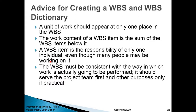A WBS item has to be the responsibility of one individual. It's okay to have a group of people working on it, but one person must be accountable at the end of the day. You need someone you can go to and ask why an item wasn't delivered or when it will be. If nobody is in charge of a specific WBS item, nothing may ever get done.